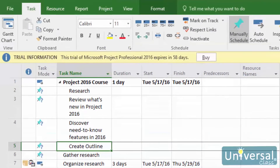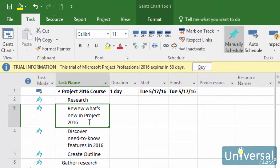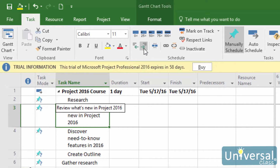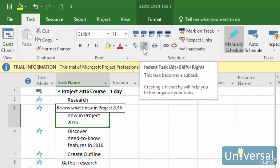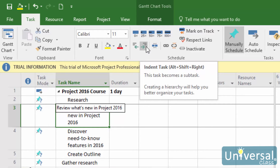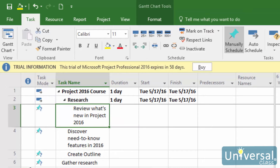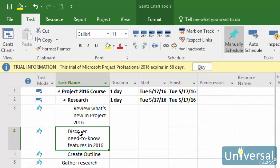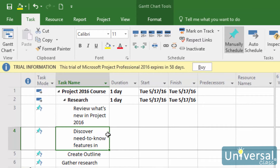Let's indent the first subtask: Review what's new in Project 2016. To indent a task, click the task to select it, then go to the Task tab. Click the outdent task button to outdent a task or move it to the left. Click the indent task button to indent a task or move it to the right. Since we're dealing with subtasks, we want to indent, so click the indent task button here. We can now clearly see that it's a subtask. Now we can do the same for the next task: Discover new features in 2016. You can see that our summary task is highlighted at the top, then we have our parent task, then we have our two subtasks.